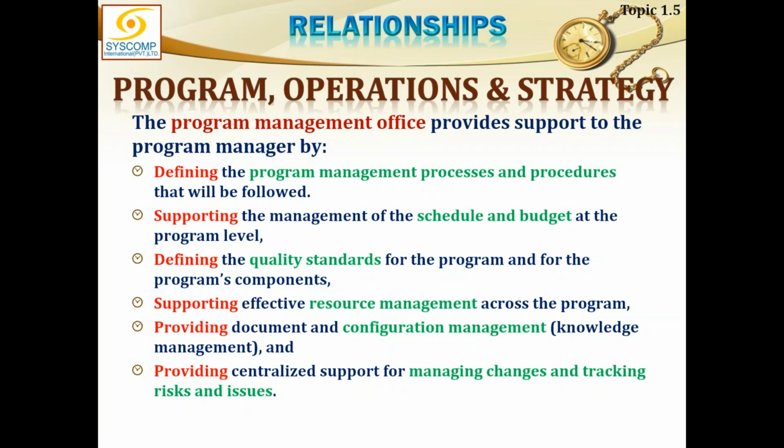Then we have providing document and configuration management, that is knowledge management, and providing centralized support for managing changes and tracking risks and issues. So this is the daily support for the program manager, and the PMO would primarily be functioning for that. And you understand the different types of PMOs: support PMO and directive PMO and what all. So this is the primary requirement.